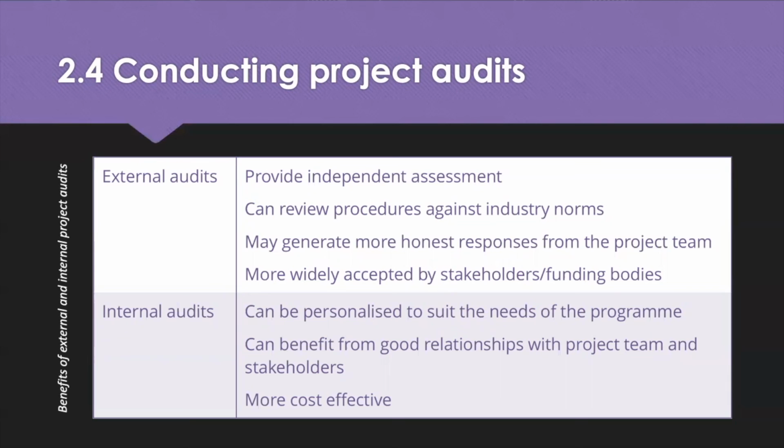The audit is usually carried out, well, it can be done by an external or an internal person. What you're doing is comparing the project performance against the initial project plan. So you'll be looking at the original PID, the project initiation document, the business case, or the project plan. So you're looking at costs, schedules, and tolerances.